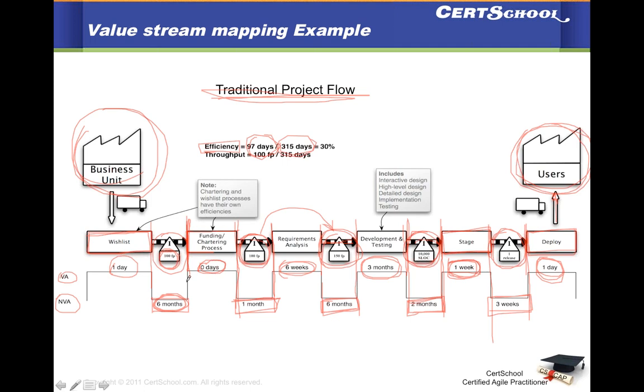In this case, you'll see 97 days as value add. It's because 6 weeks is treated with Saturdays and Sundays off, so it's taking 5 working days in a week, 5 times 6, like that. The same goes for months, so you'll see slightly odd figures here in the days.